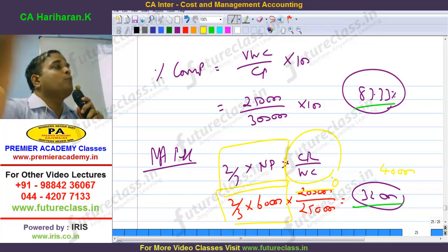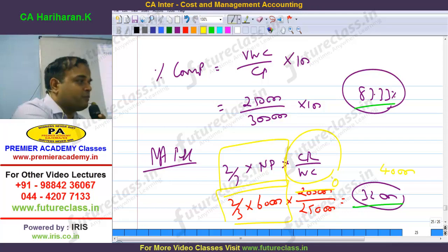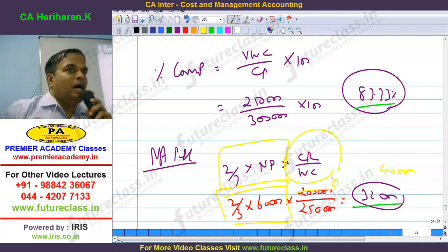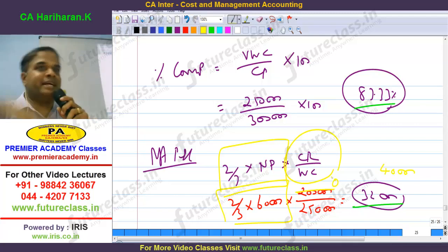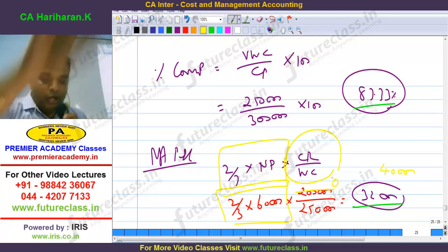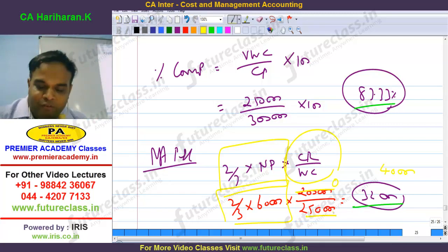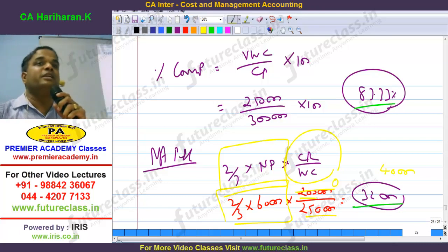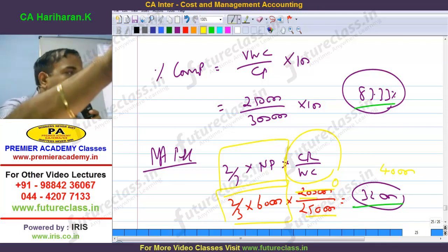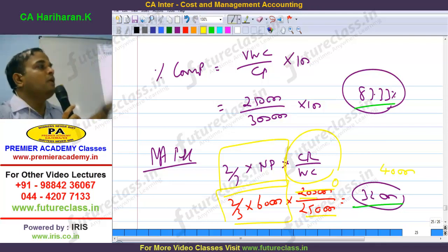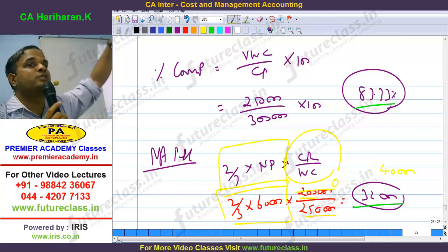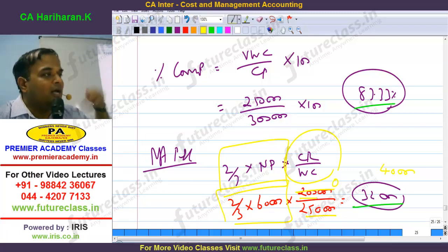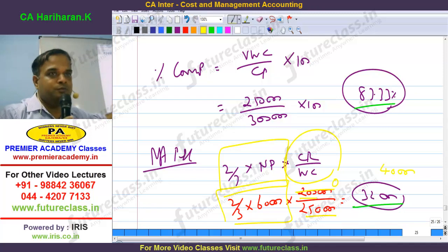Out of capital I am going to take, winding up going to liquidation sale. Then you are eligible to get 40,000, but originally you are eligible to get 2,50,000, out of which you are getting only 2 lakhs. So even though eligible for 2,50,000, only 2 lakhs can be enjoyed. Then 40,000 you are eligible, proportionately you are going to accrue, because contractee is not given the full money. In the same way proportionally we reduce the profit.